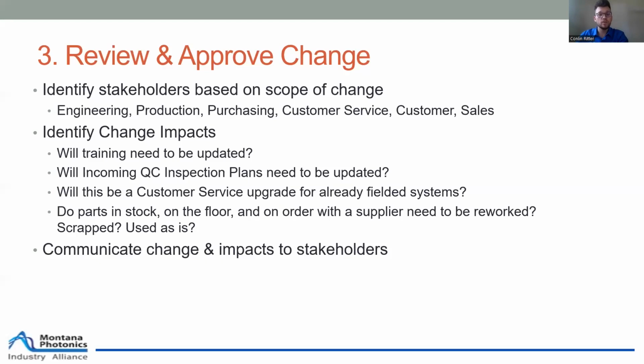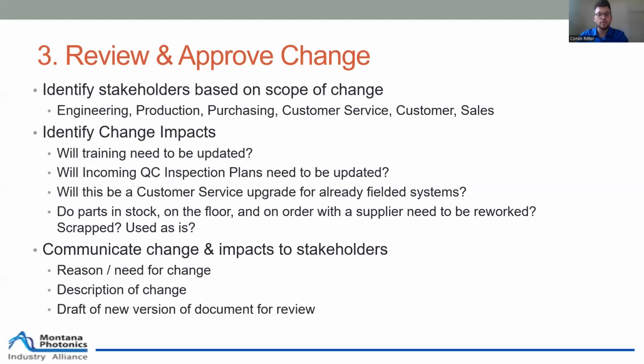So once you've thought through all this, you need to go ahead and communicate that change and the impacts to the stakeholders. Communicate the reason or need for change, communicate the description of the change, and provide them a draft of the new version of the document for them to review.